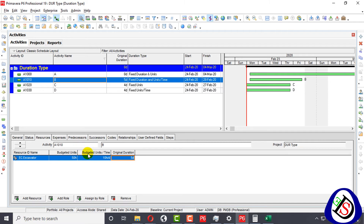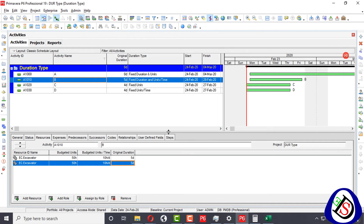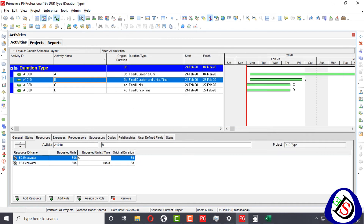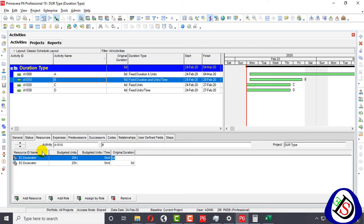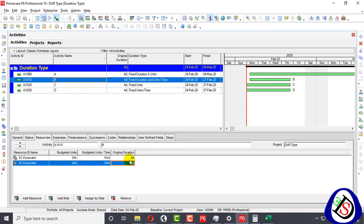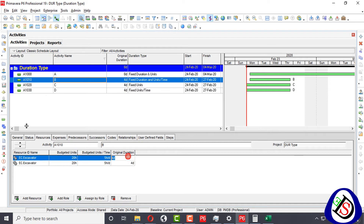I will show something more — if I add another excavator resource, I can have two resources and calculate fully. For example, 25 and 25 making 50. If I change the duration, it remains the same for both. If one is 5 days and the other is 4, the original duration shown will be the larger value — 5. The key point is that original duration and units per time are fixed, and you calculate the total budgeted units.